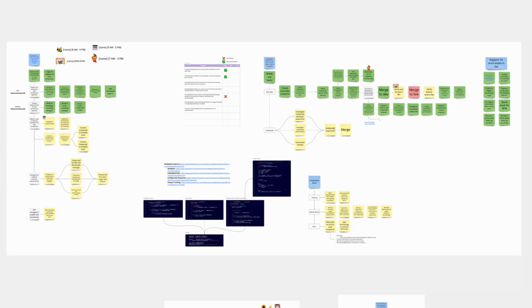There's only one way to deliver faster today, as opposed to the decisions you made six months ago that affect your progress today. If you want to deliver faster today with the team you have and the system they're in, you have to cut scope. That is the only way to deliver faster. So thinking in terms of valuable increments and how you can make those increments smaller is how I help teams with this. And then I focus on internal quality, which is how easy the code is to modify and maintain, which will make me faster in six months, but it won't do anything for me today.